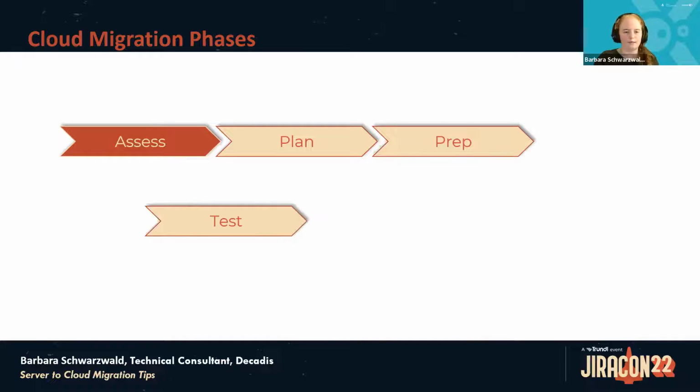And then the very important step that you should please not skip is to actually do test migrations. It does not necessarily have to be a complete full migration of everything, but you will at least want to migrate some projects. And also very important in this testing is to not just do it on a purely technical basis, but also include your key users, so that you can better see their challenges in the new cloud environment.